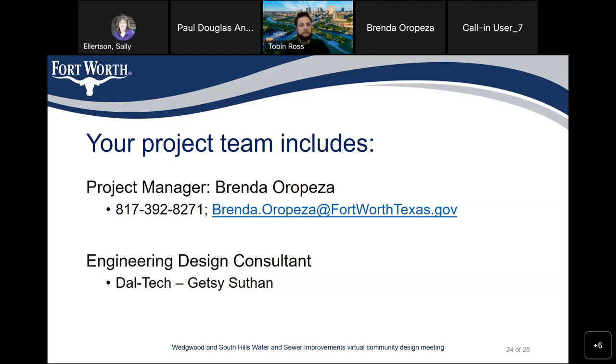Okay, Laura has another question later. If they know about impacts to sprinkler systems, it would be good to know provisions for that. Can you explain that? Yes, so we do have a pay item for the contractor to go out there and locate those irrigation systems and cap them before they start construction. So they'll go out there, cap the systems, ask you to turn them on to make sure they're not damaging anything. Anything they damage, they will be responsible for repairing.